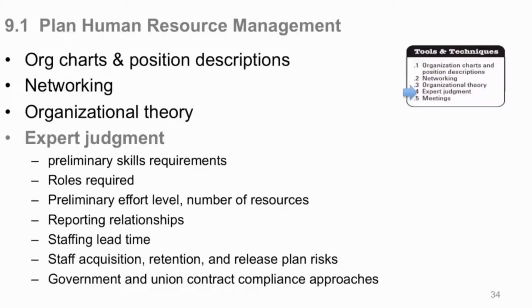Can I wait that long, or do I have to take a lesser resource that I need now? Staff acquisition, retention, and release plans. You always have to have an exit plan. How long are you going to keep staff, and when are you going to release them? You need to know that in advance so that their managers, if they're not from your direct group, and other project managers who may want these people know when they can plan for these people to be available to you, or to them.